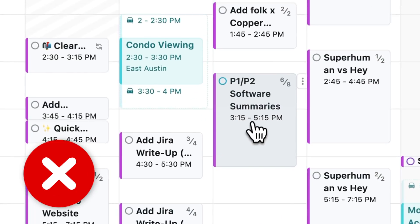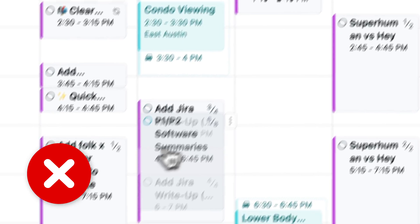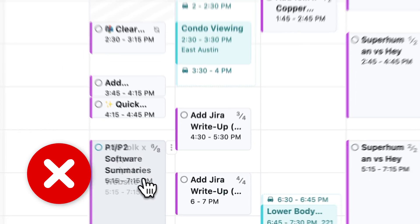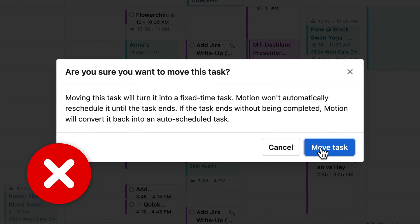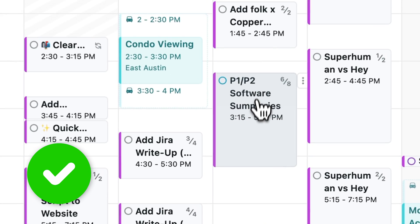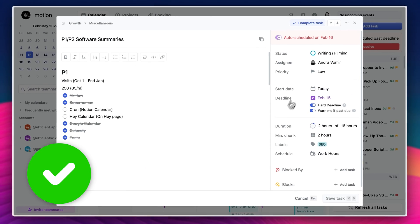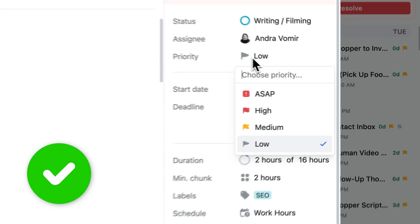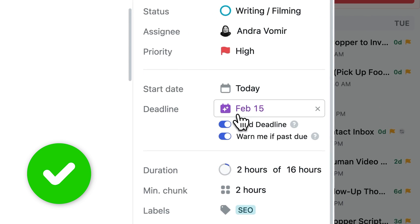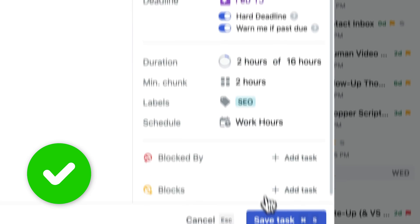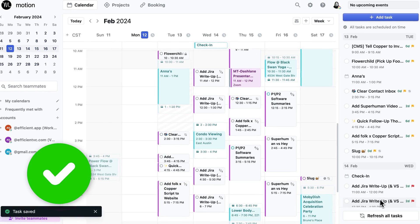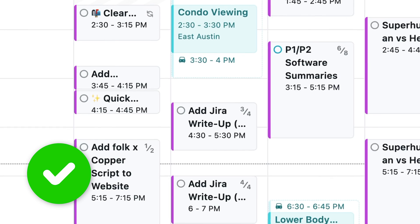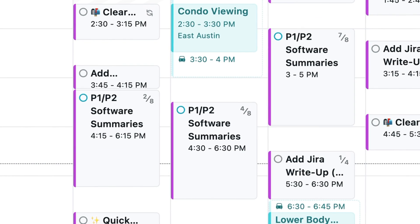You don't want to manually drag the tasks around because that's going to lock them into motion. Instead, what you want to do is just change the priority. And just like you would tell your assistant, hey, this is high priority. This is low priority. This is medium priority. You can do that with Motion and it will automatically rearrange your tasks for you.